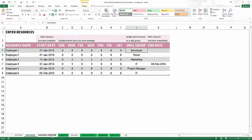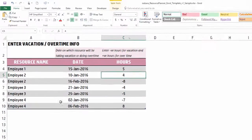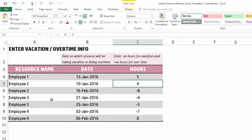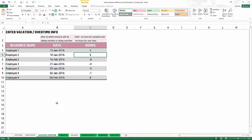Then we have the Vacation or Overtime sheet. This is where you enter information about an employee taking vacation or doing overtime. You put in the employee name, the date, and then a positive value if the employee is working overtime — meaning more capacity — or a negative value if the employee is taking vacation — meaning reduced capacity.